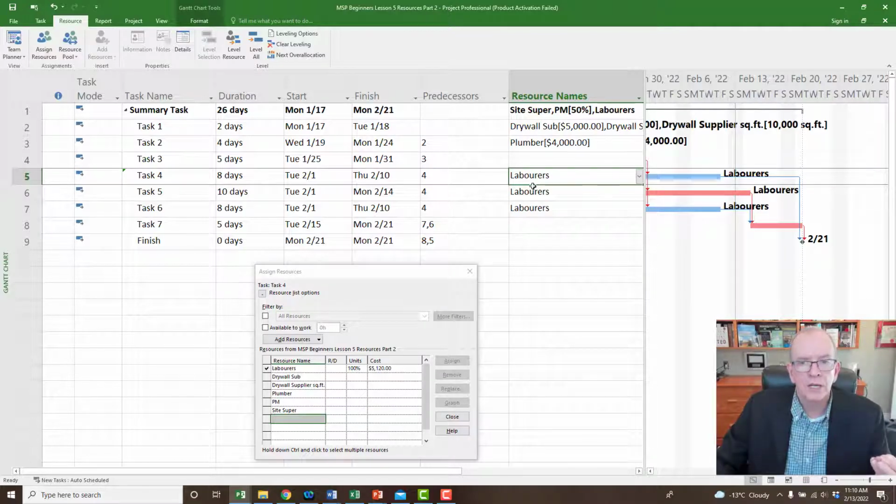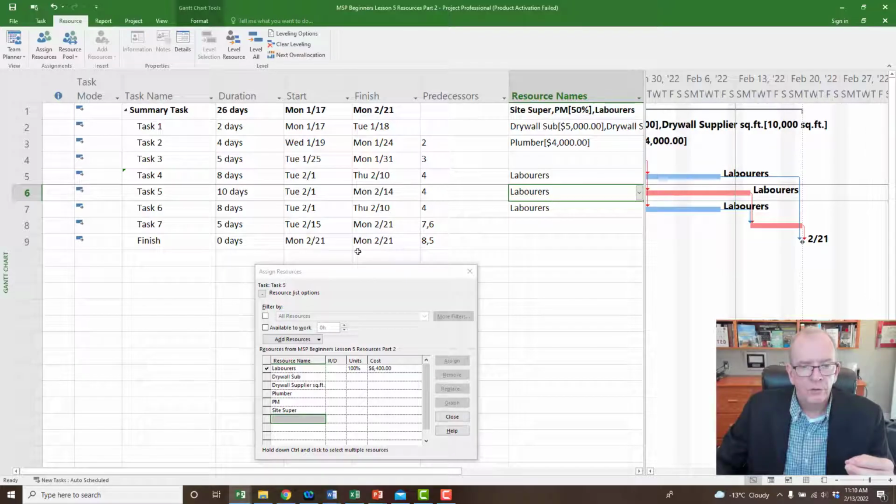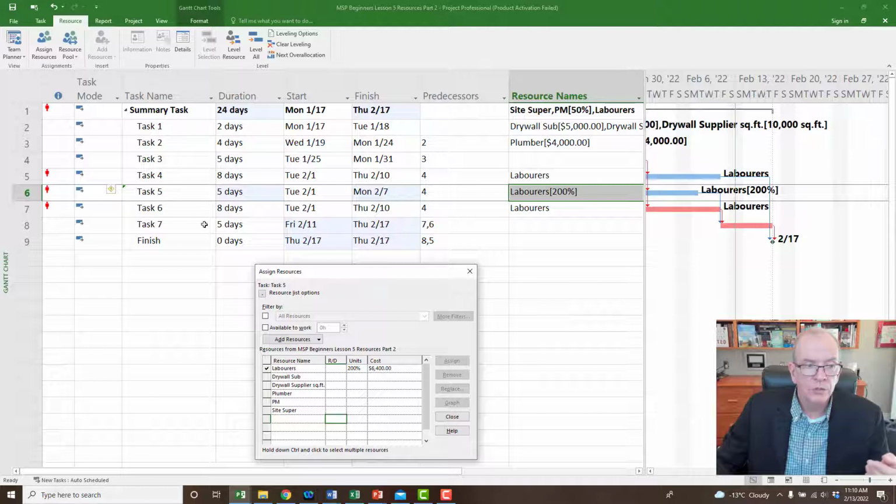Microsoft Project will change the durations when you change the allocations on a resource that you already assigned. So if I added another resource here, so if I said this one, laborers, I now want 200%, that should be changing this down to 5 days, right? It shouldn't change my price because it's really the same amount of hours that are working, right? So it changed it to 5 days, but then of course I've got that same problem occurring with over allocations. It did change what was critical.